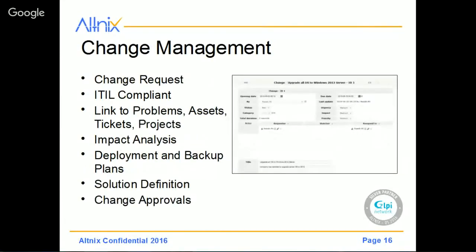We also have a Change Management module. This is where you can initiate a new change request. You can link a particular change request to problems, assets, tickets, and other projects. You can do an impact analysis of what will happen if you make this change. Based on that, you can come up with a deployment and a backup plan, and define a solution on how this change is going to be implemented. Change processes often require approvals by different people — something called a change approval board or change control board. You can define changes and have approvers who approve or reject the change, which is a way to define approvals for different changes within the ITSM module inside GLPI.